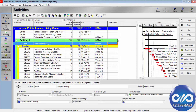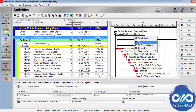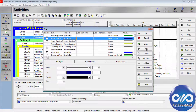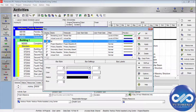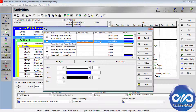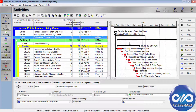Back in the Activities window, you can also customize the Gantt chart bars. Right-click on the Gantt bar, click on Bar, and add a new bar named 'DP'. Under finish date, select DPEnded — it may be selected by default. Tick the checkbox to make it visible in the Gantt chart. This is how you display user-defined date bars in the Gantt chart.